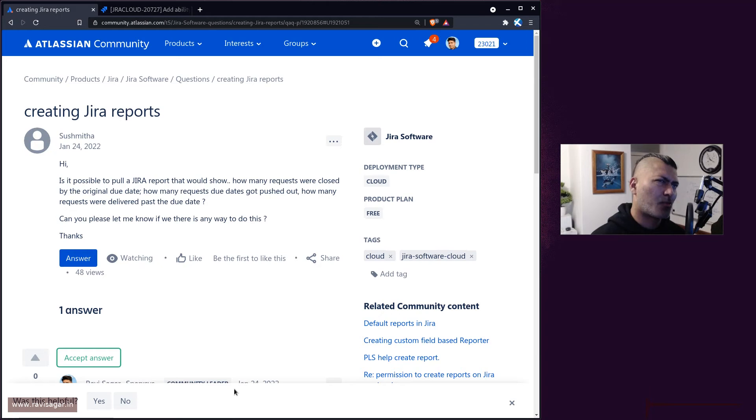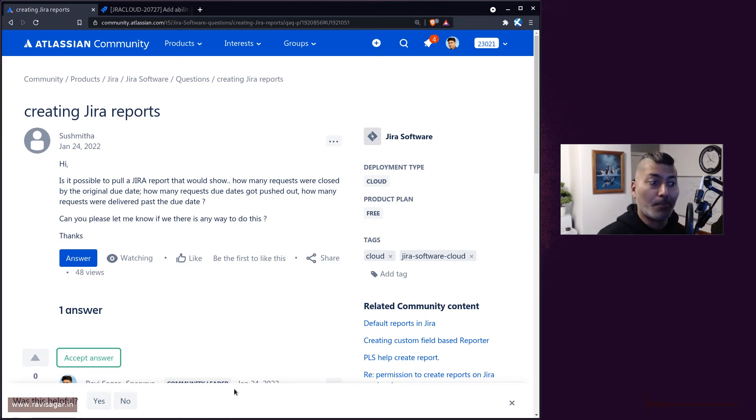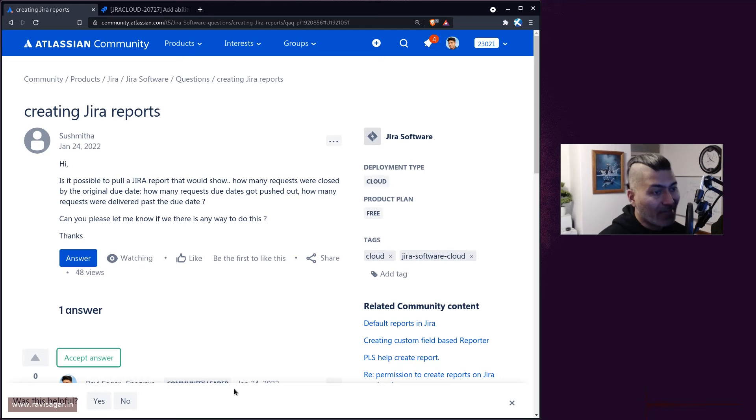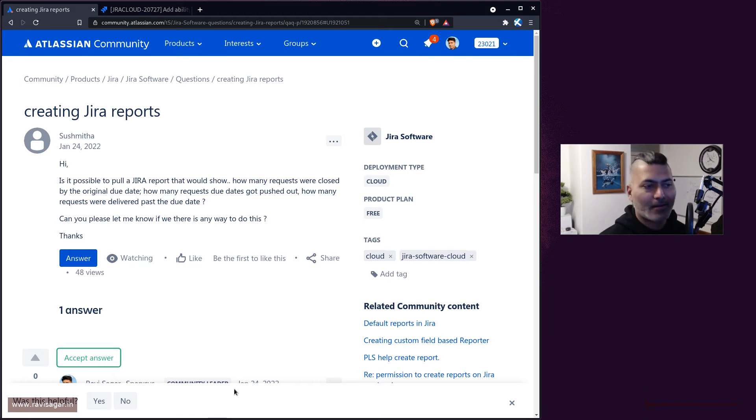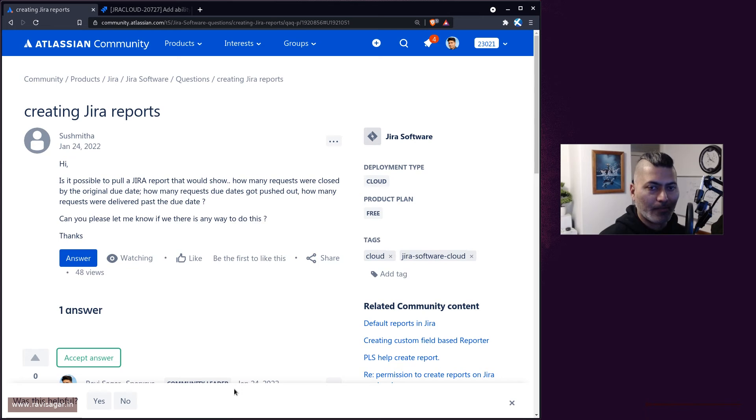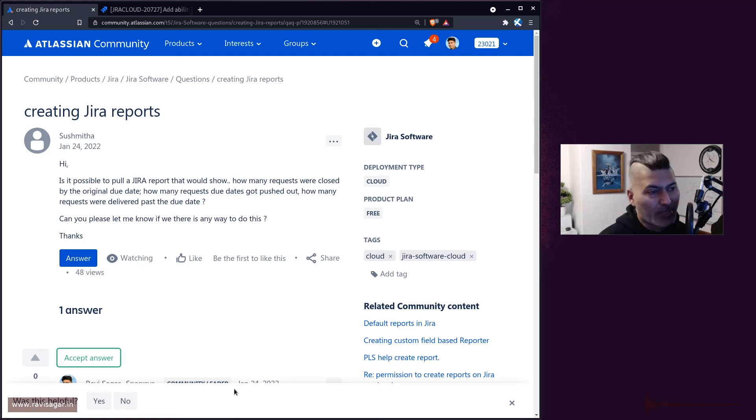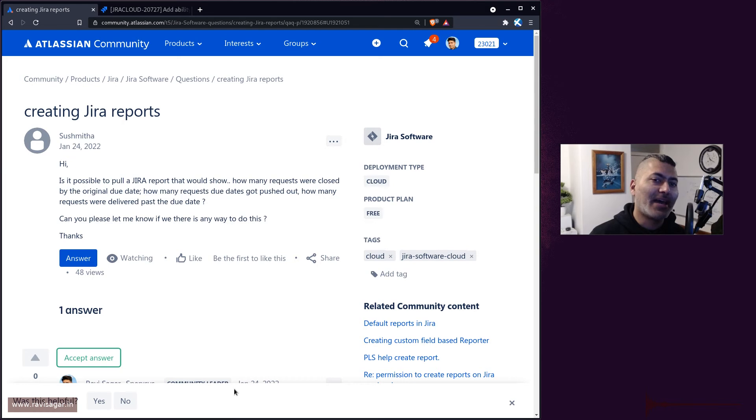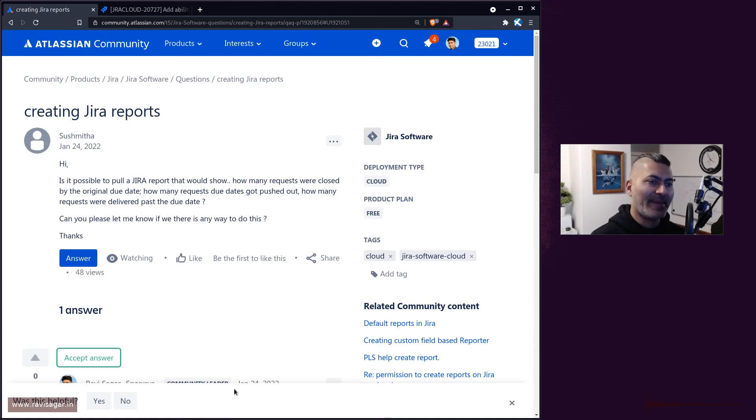You can calculate numbers, purely in terms of numbers, like the difference between due date and resolve date. If it is positive, it means that this issue was resolved two days after or three days after the due date. I'm saying number custom field because you may want to export it in Excel, or when you have this number you already have this calculation with you.